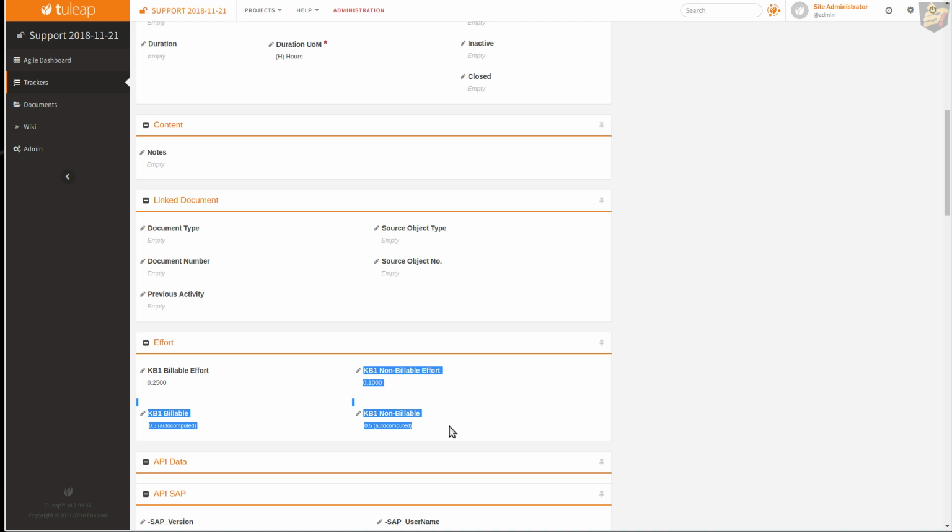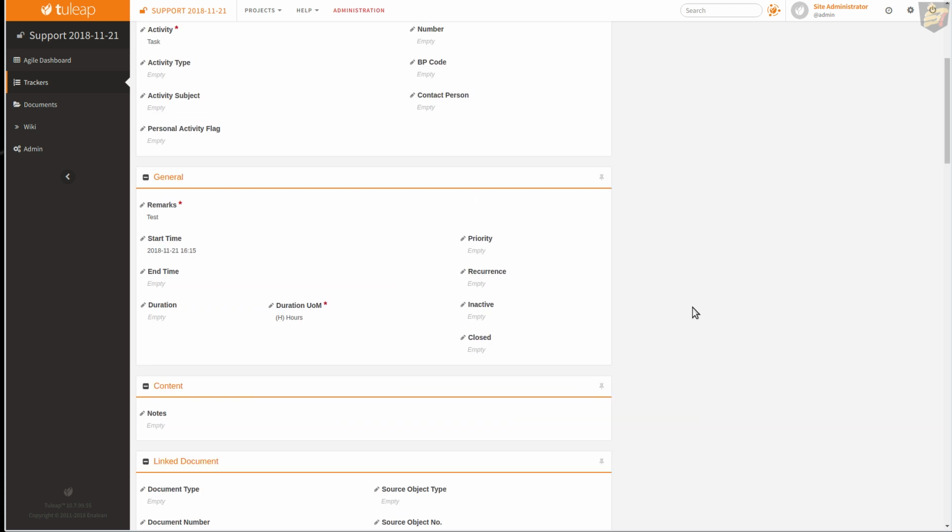But it's hard to measure that because they were under on 10 other tasks that they were working on. But the ones that stand out are the ones that are over. So working at the story level, kind of just grouping all of those tasks together, makes it a little bit easier going through all of that.